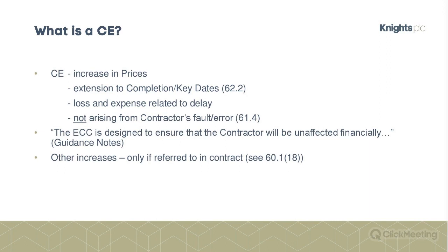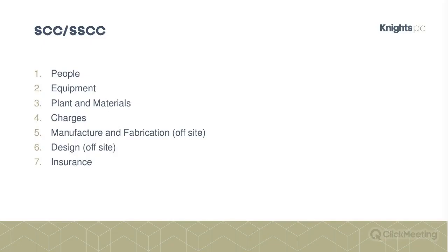So, for example, that can be not a great position for a contractor if we're looking at contract rates for materials and the cost of materials has gone up, the cost of labour has gone up, something like that, potentially it means the contractor's doing the work but not recovering all the money that it should do.